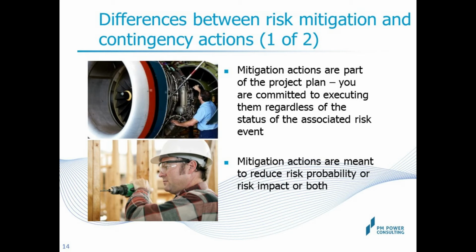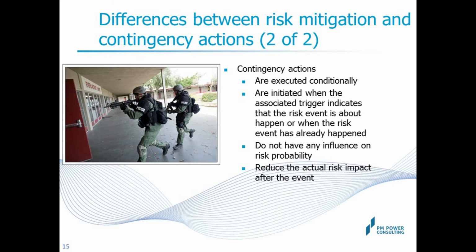You have adjusted the plan and the workload for the senior persons so that they can devote quality time to mentor the fresh developers. So you are deciding on implementing this upfront. You are not waiting to see the poor quality of code before deciding whether to install the mentoring program or not. So this action is being taken unconditionally and proactively to reduce the probability of risk and maybe the impact as well. That is the hallmark of mitigation actions.